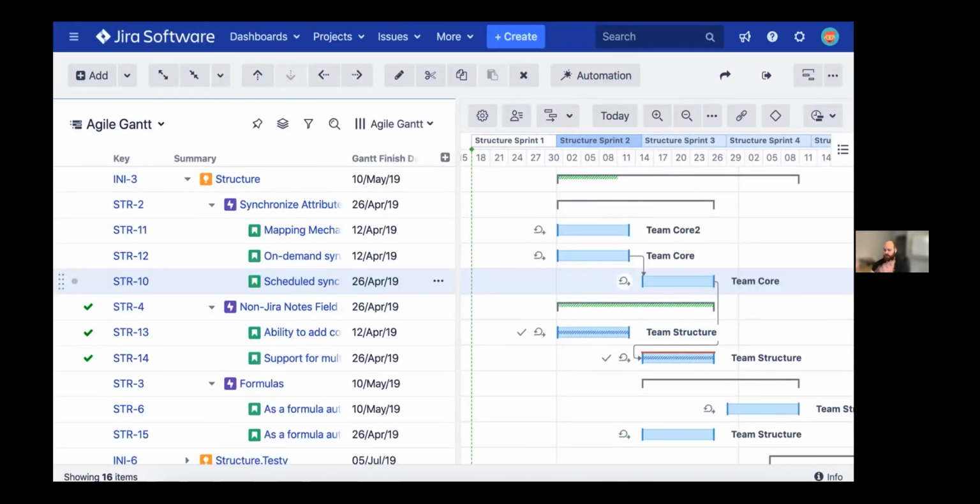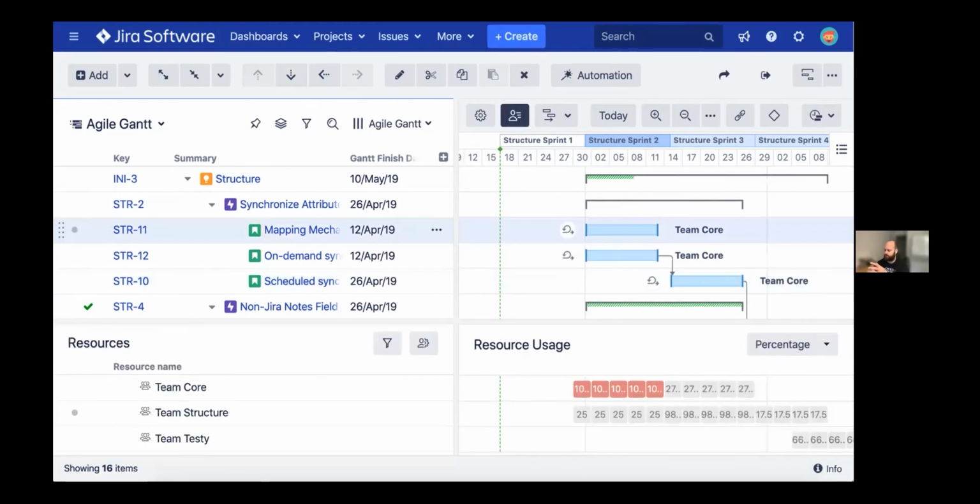Because this is information coming out of Jira, you can also use it to pull in capacity information. Is this plan even feasible, or am I asking people to do 100 or more percent of their allocation, right? The famous quip is that project managers are the type of people that think nine women can birth a baby in one month. Not true, obviously. So you have the ability to add sanity checks for your teams and say, hey, these things are over-allocated. This is not a realistic plan. There will be problems. And you can do this during PI planning sessions or afterwards.